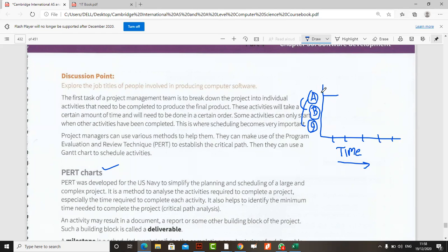But the point is that, for example, the initial input form that has to be designed will be designed by the designers from this time to this time. After that, the database needs to be designed, starting from here and going to here. Once the database is being designed, probably in between, we can start developing the reports as well. So some of the parts you can see over here will be going simultaneously. Some parts can work in parallel. Some parts will work when one part finishes, then the other part starts.